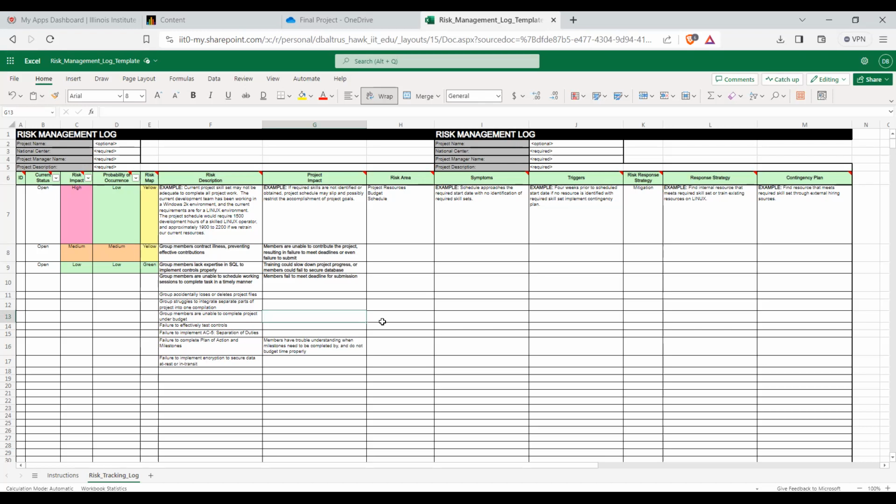So there's no incentive for finishing early. The only contract that gives you an incentive for doing something early is called a firm fixed price contract, right? That means you say, I'm going to do this work for $500,000. If you get it done for $100,000, you just keep the rest. However, if that same contract takes you $1 million, your organization has to pay that $500,000 difference. So it depends on the contract vehicle. There's time and material, which doesn't matter because there's generally a flat fee as well. Some contract vehicles you can make a lot of money, but if it's cost plus, firm fixed, or time and material, it doesn't matter.